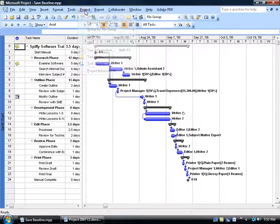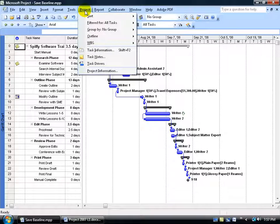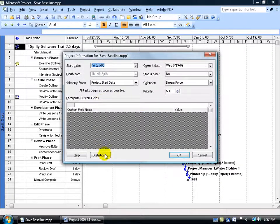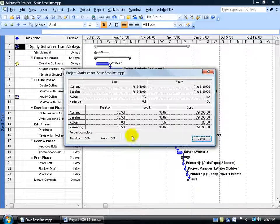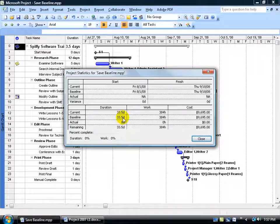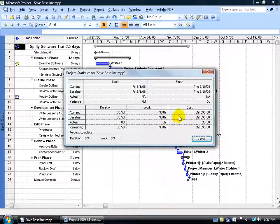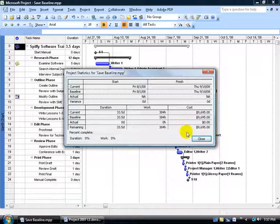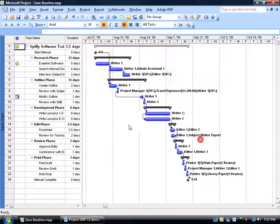Again you can come up here and go Project in the menu down to Project Information and click on Statistics and get the cost over here for the entire project. But if you want to see it broken down by task and in greater detail, let me close out of here.